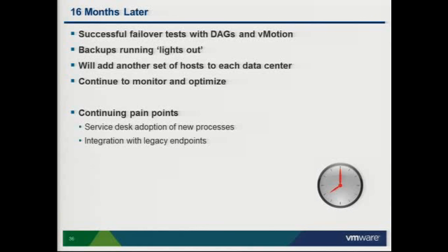So role-based administration, using different tools like the EMC or PowerShell. These are new skills that service desks and second level support need to get training on ahead of time. So you want to get out in front of that as quickly as possible. Get them and operations looped into the migration process as early on as you can so that they're familiar with everything and it's not just coming on the back end.